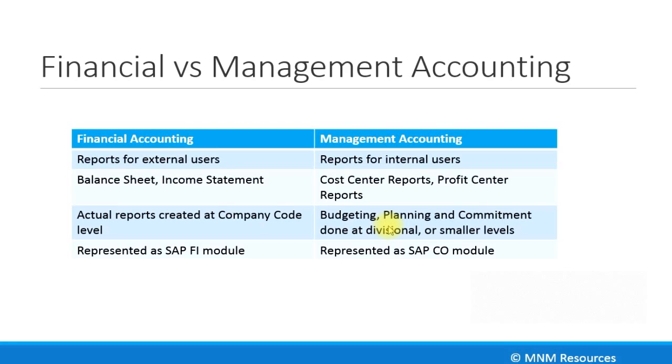And also for your commitments. For example, for one particular project, you might have already committed 50,000 worth of purchases from a vendor. You have not done any financial transactions yet, but you have raised a purchase order, so that becomes a commitment. These can all be monitored via the management accounting reports.